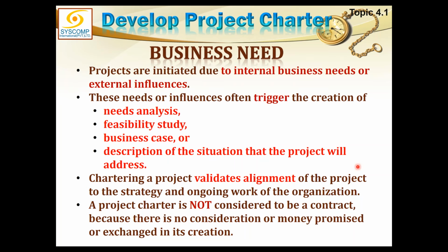A project charter is not considered to be a contract. Yes, I have been saying earlier also, although the contract and charter were discussed on the same page earlier, it is explicitly said that charter is not a contract. This is just an assignment from a project sponsor to the project manager to mobilize the resources.